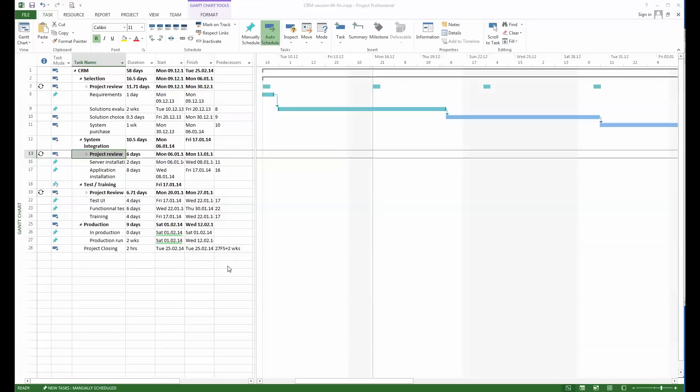Now what we have to do is define resources, because normally you define phases, you define tasks, then you define dependencies, you can also define constraints, and then is the moment to introduce resources that will do the job.